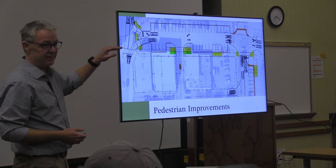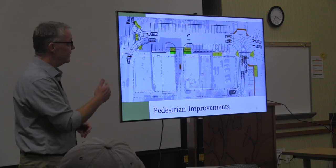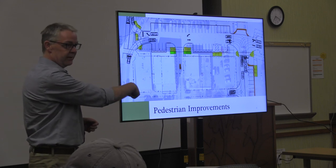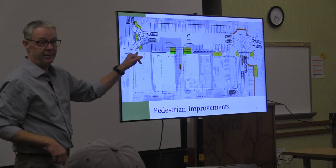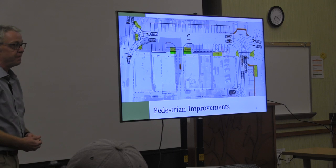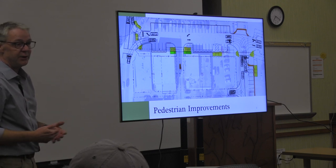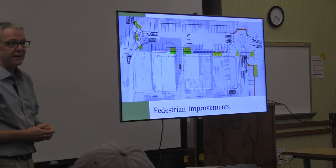And I mentioned earlier that this is not going to be a public road, and so it's got to live by public road guidelines. Their concern was that, as is, it can be a difficult turn with a lot of wait times, particularly if you're turning south, and that it would back up the road and cause congestion as far back as Oak Street. So this was one that our engineering firm worked very closely with VDOT to resolve, and this is where VDOT landed. Because VDOT is co-funding this project, and because we want this to be an accepted public road, this was the design direction.